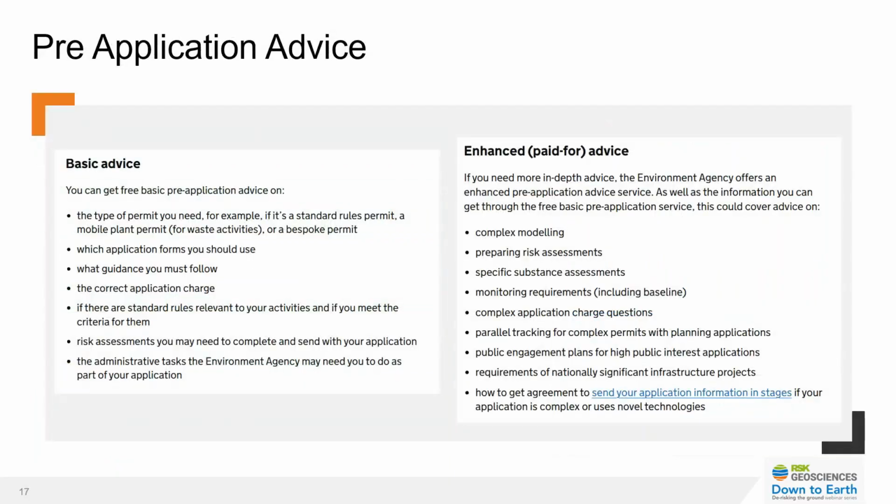So pre-application advice is something that's offered by the regulators, although I would state that it is non-mandatory, and it works best when you've prepared clear, concise questions which will help define the scope of works, including confirmation of the type of permit required, the supporting information needed to support the application, and confirmation of the charges to be paid as part of the application process.